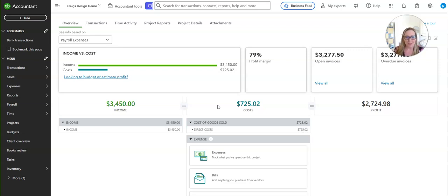There's so much to this, but the easiest thing that we can do to kind of get them started with job costing is to enable that projects feature in QuickBooks Online so you can start assigning every single expense and every single revenue to a specific project and job, and then your clients will have this beautiful dashboard that they can come and see their profitability on each project.